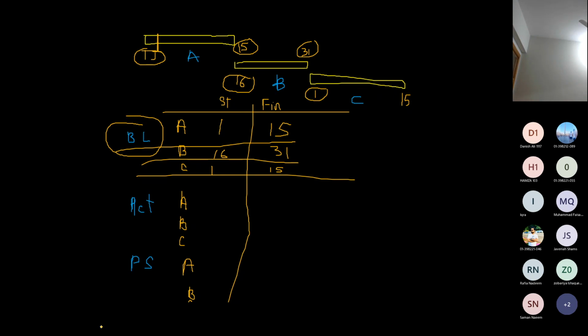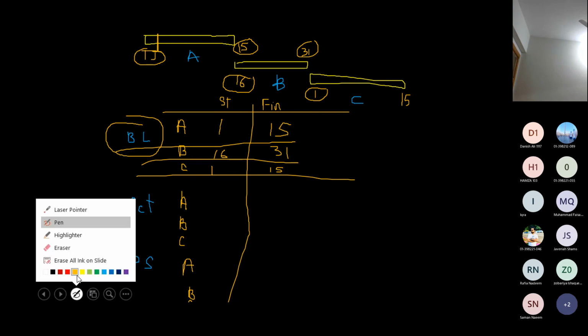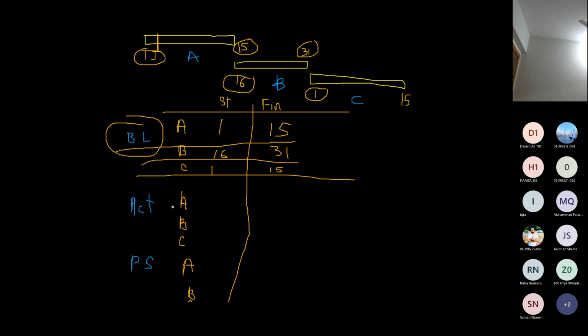But are you sure that my project would actually start on the same date? It may or may not. So now we assume that the first activity luckily started on the same date. This is actual. Actual start of A is also 1st January. However, the actual finish is 20th of January. This activity was delayed by 5 days for some reason.